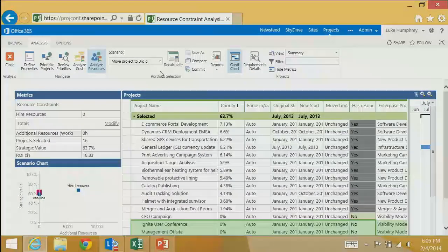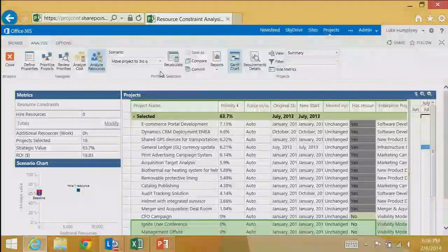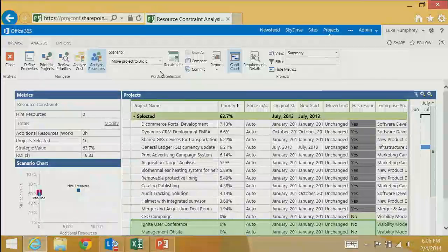Yeah. Many companies use annual budgeting cycles, and they don't say they've got 40 million available for projects. They say this year we've got 40 million. So how can we configure the system to take an annual segment of budget into account? Right. If you're looking at just the annual cost, you want to compare apples to apples, so you want the cost constraints at the investment level to also represent the year. That's what you want to change. In that case, you can have multiple fields, ensure that those fields represent years, and then constrain the portfolio that way.